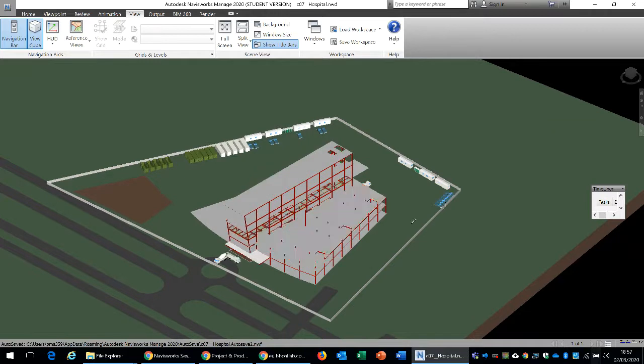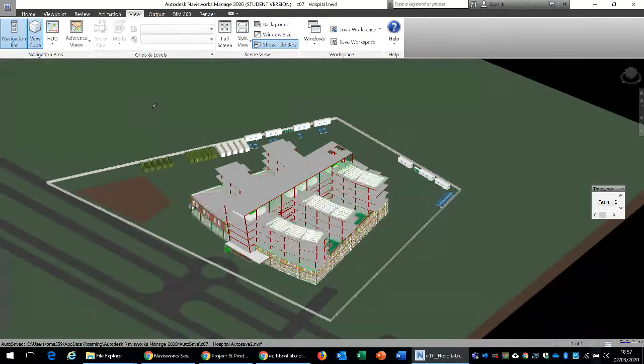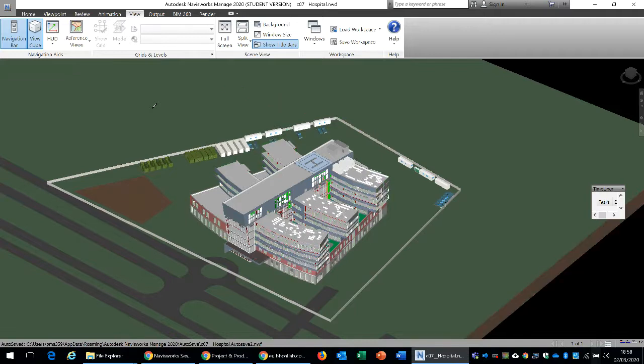So you can run the simulation, and the overlay information should be displayed in parallel. There could be a number of different objectives for the simulation. You could possibly use it to communicate this information with your local community, for which you would just need a granular view of it, and you could pause your simulation at different points and explain to your local stakeholders the key phases of this project, or you could have it at a more micro level for maybe a weekly or a monthly look ahead planning and exploration of different options.